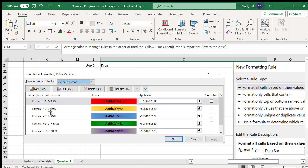For orange, G10 is less than 50%; for blue, less than 75%; and for green, less than or equal to 100%. In case some activities have greater than 100% achievement, we use purple. But most cases use red, orange, blue, and green, constructed using the conditional formatting Manage Rules option.